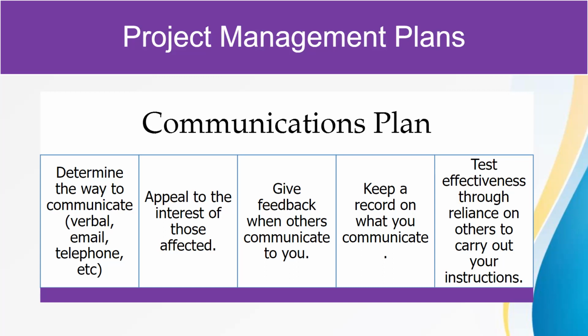So everybody agrees that on this project, official communication will be done through email. So even if you call me and so on, you still have to send it through email so that we can have it documented. Then we also keep on record what you communicate. It's very critical. So everything you communicate, keep it on record. If you are using email communication, it's advisable to create a label, a folder in your email where you can put all the documents you're receiving through that particular project in that folder so that you can account for every piece of information you receive.